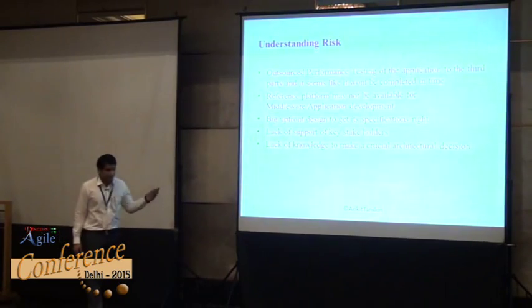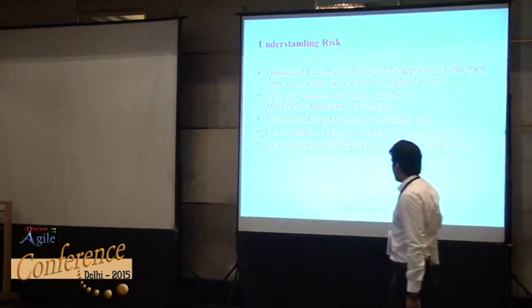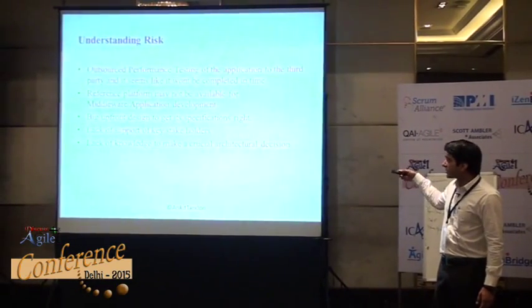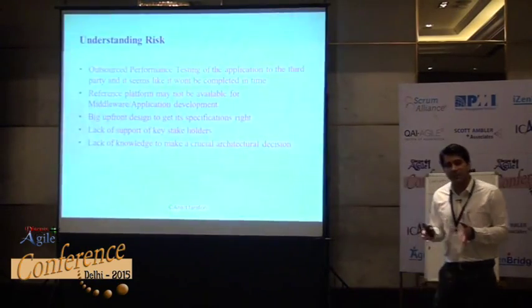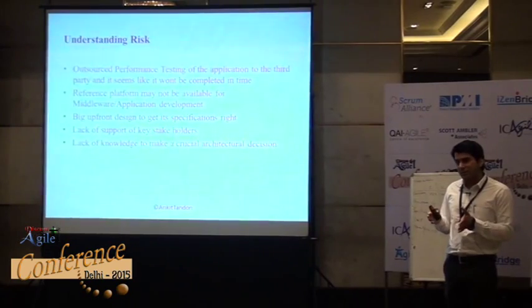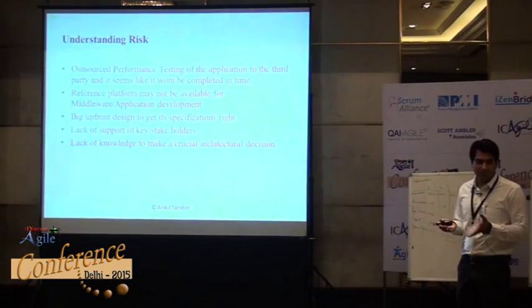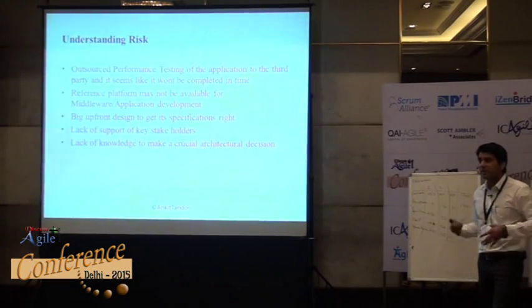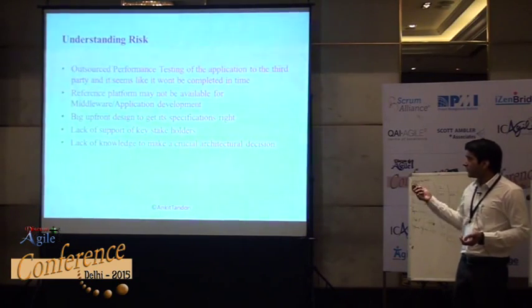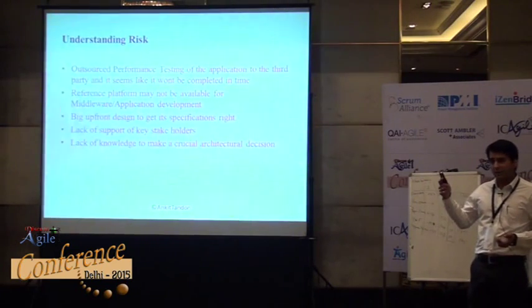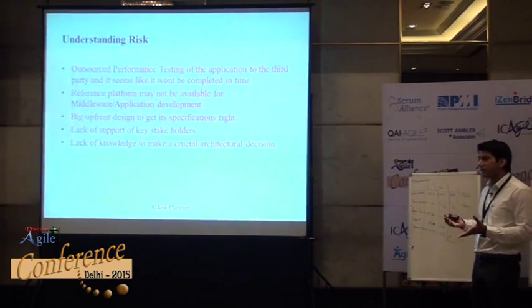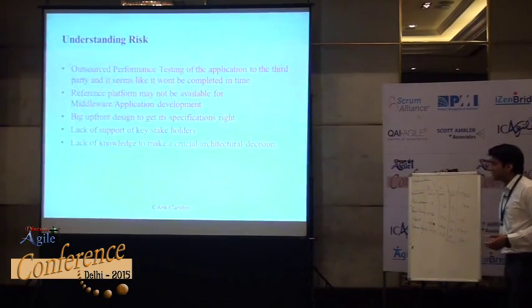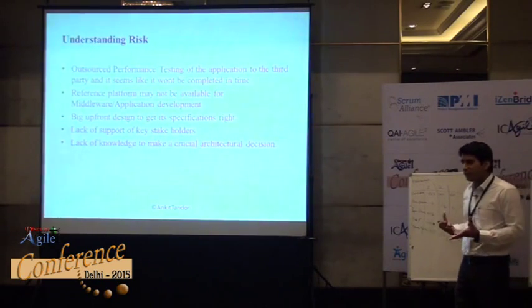Here are a few examples taken from one of my project's risk registers, with references removed. These are examples of risk that can happen in a project. For instance, we're two years into a project and we've outsourced performance testing to a third party — there's a risk they might not deliver on time. Or big upfront design to get specifications right — we keep hearing we shouldn't do that, which is again a risk. Lack of support from key stakeholders — not only the customer but internal stakeholders like POs, sales, or marketing — and lack of knowledge to make crucial architectural decisions.